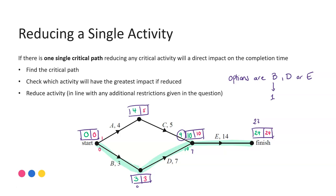If activity D was worth zero, then I have three plus zero — three at this point — but again, nine would have to carry forward, so I'd only save one unit again. If activity E was completely reduced to zero, then my new completion time would be 10, meaning I would save 14 units off my completion time, giving me the best possible outcome.